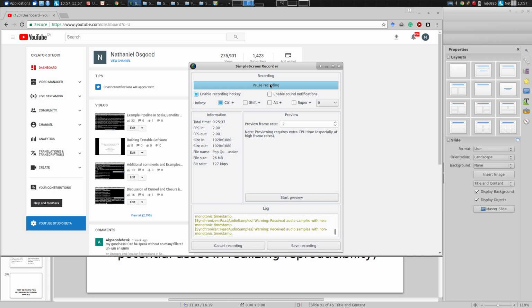That's the next question. Didn't know that. Sorry. Risk exposure. Yes, risk exposure is actually at a technical level the product of some estimate of probability and severity if it happens.